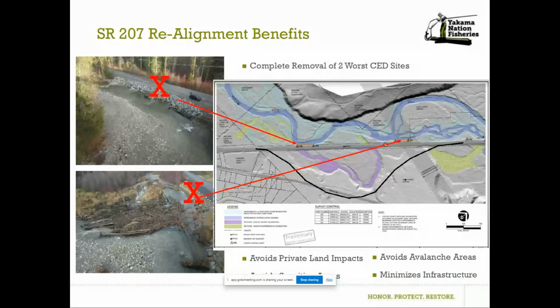Yeah, so you're referring to one of the attachments, which was our concepts for this reach, which we were just talking about building to once we know the direction we're going to move forward with. But what we would do is dig down, and your goal is to match existing topography. So, we get down to those levels. Basically, you're going to remove all the fill that they put in there.